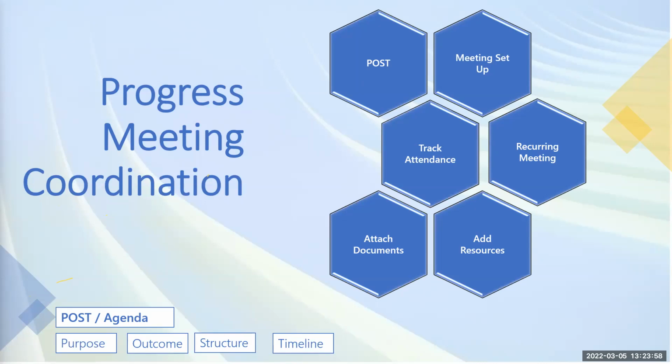And the key things that need to be in the action log is, what's the reference? You need to have a reference number to understand the numbering. And then you need to have the date. What date was this action raised? Who raised this action? Who is the action owner? What is the action about? What's the title and the details of the action? What is the due date?